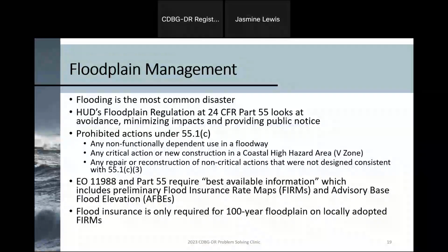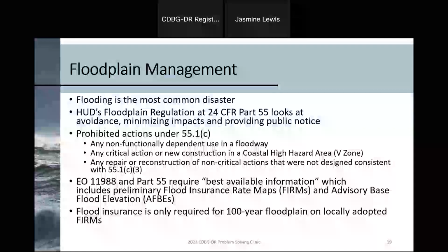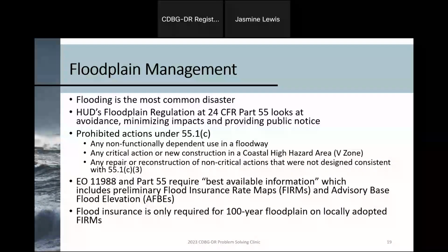That way, when it's actually in motion, you can already have that tier 1 broad level review complete. By the time you are ready to accept applications, you can have those ready to go and complete the tier 2 for those. So it really depends what you have left, but it can substantially expedite the process.